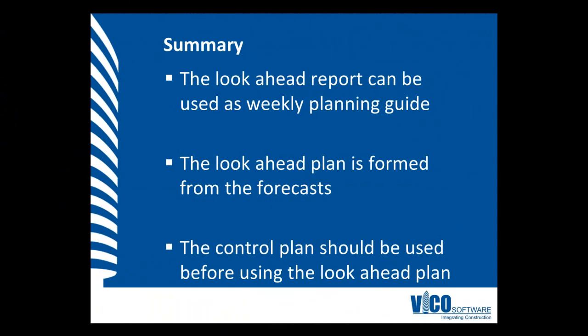In this vignette we've learned that the Look Ahead Report can be used as a weekly planning guide. The Look Ahead Report is formed from the forecast and should be used only after the forecast has been updated through the control plan.